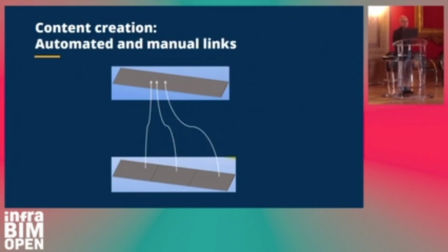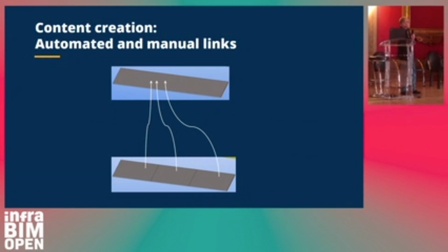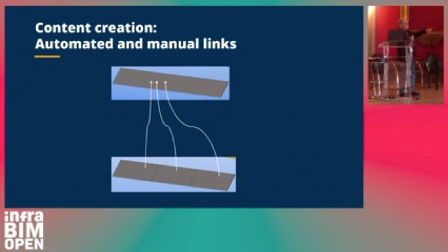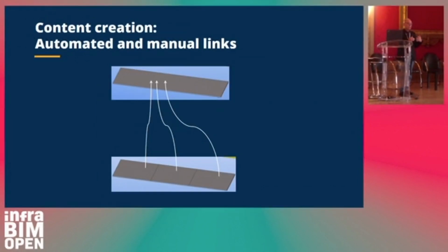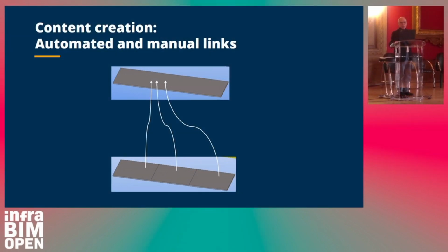And we can also, I'm coming more to the linkings later, automatically create links so that the engineer's objects know which architect's object they are dependent on, and vice versa. The architect's object can know which engineering and other objects are dependent on that object. So the architect can estimate that if I change this slab now, what will happen? So this will work throughout the project.